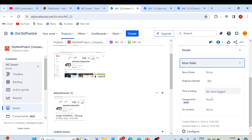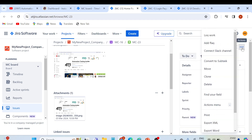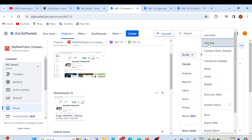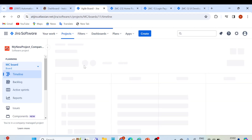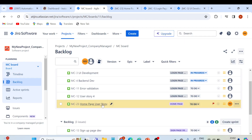Coming back to this MC-23, we have more fields available — story points, which I'll cover in a separate video. There are also component and version fields. If you click on the three-dot menu, you have different actions: you can log work to record how much time you're spending on this user story. You can also add a flag. Once flagged, if you go back to the backlog, you'll see that issue has been flagged — you can see the home page user story marked there.